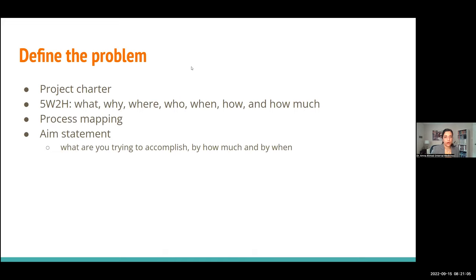When defining a problem, you can use a project charter — available from Ontario Health, IHI, or online — to outline your team, aim, measures, stakeholders, budget, and timelines. You can also use the five W's and two H's (what, why, where, who, when, how, and by how much), similar to a PICO research question. You want to develop an aim statement: what are you trying to accomplish, by how much, and by when? For example: 'Our team would like to reduce catheter-associated UTIs on medicine ward E3 by 30% in six months.'